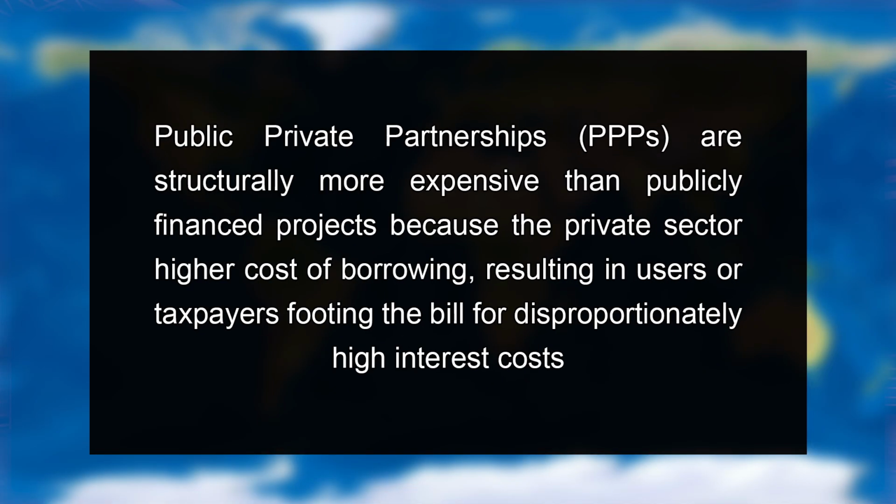PPPs are structurally more expensive than publicly financed projects because of the private sector's higher cost of borrowing, resulting in users or taxpayers footing the bill for disproportionately high interest costs. PPPs also have high transaction costs.